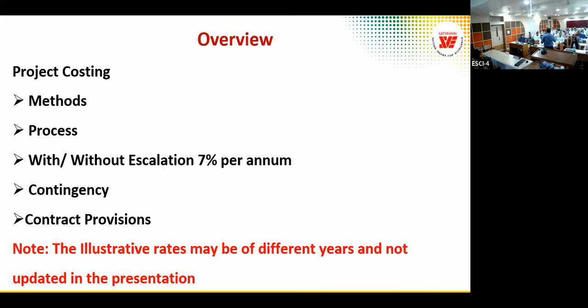Instead of going for ministry notification or ministry index declared on the website, I say that SAIL or VSP, I go by the price declared on the website every day, and I take quarterly price variation and price adjustment. It is plus or minus 5%. Yes. I follow that. It is an accepted FIDIC clause. Is there any CVC guideline regarding this? You provide us that, so that we will put it in. I'll share the CVC guidelines I have.